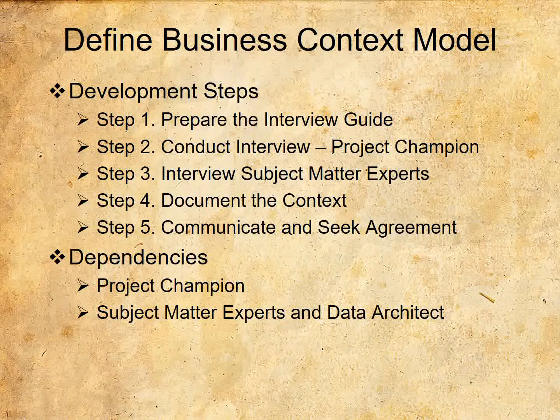Communicate and seek agreement. The context diagram will evolve during the course of both customer and product requirements activity, and represents an understanding and agreement between the requirements, data architect, project champion and other stakeholders. Therefore, it is critical that the context diagram is viewed as a living document, which is reviewed and updated frequently throughout the project. Furthermore, it is recommended that the context diagram be made easily accessible to all stakeholders and published using simple, but effective, revision history procedures.